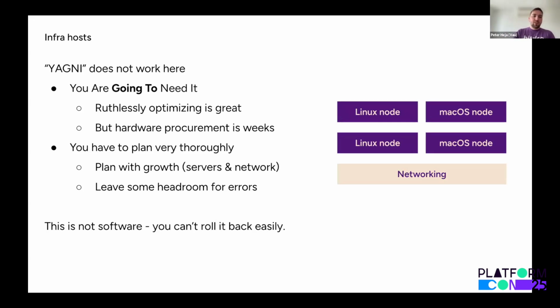So you will have to think ahead, obviously, how you expand, but also when you are ordering things, think ahead to, I don't know, 1.1x scaling as well, to have a little bit of headroom for maintenance, a little bit of mess ups and logistical issues.